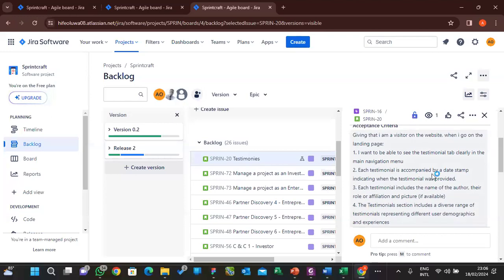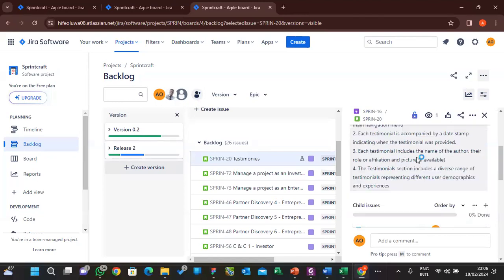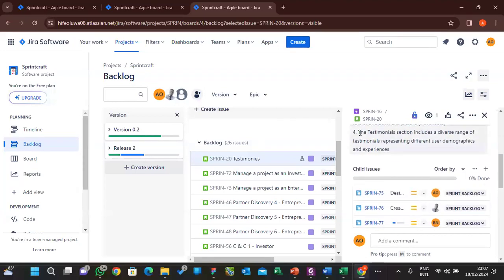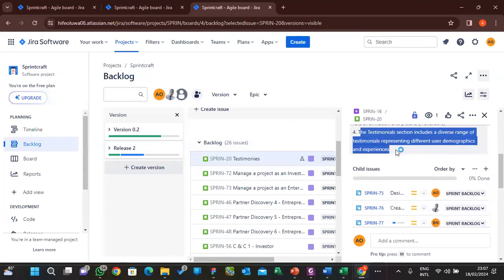He will tell you, I don't think it's supposed to take us that much time, because of this and that. Then you ask the remaining 3 that chose 3 as story points, guys, what do you think? They will give their further explanation. Of course, the product owner will be there to clarify the acceptance criteria he has written here. After further clarification, the people that voted 3, 1 and 5 may decide, okay, let's revote again, or let's go with 3.